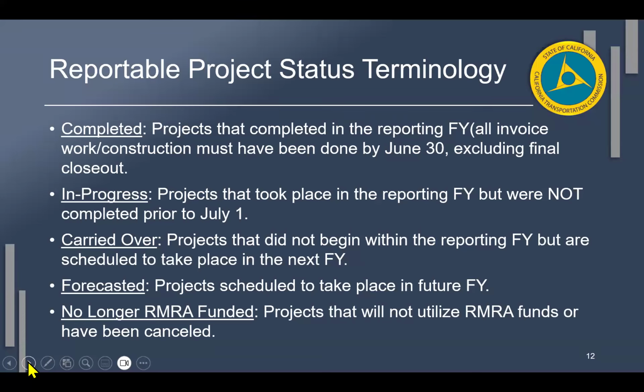Carried over, this is a project that had no activity in the fiscal year, but is expected to start in the coming fiscal year. Forecasted, we reserve this for those projects that are more than one fiscal year out. A lot of times, again, this is where our rural counterparts are really shining in this area, because they are future forecasting out projects that they have to reserve their funding from year to year in order to be able to deliver said project that they've identified.